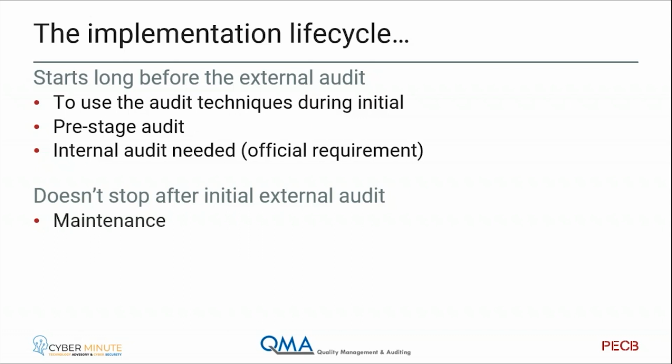There's a slight difference for the implementation cycle, in that you must be aware that the implementation itself starts a bit earlier. Of course, you make the decision to start the implementation. It's nicely explained also in the lead implementer course at PCB. So you must count that in most situations, even for smaller companies, it takes more or less a year to implement the full cycle, because you will need to change processes and change procedures.